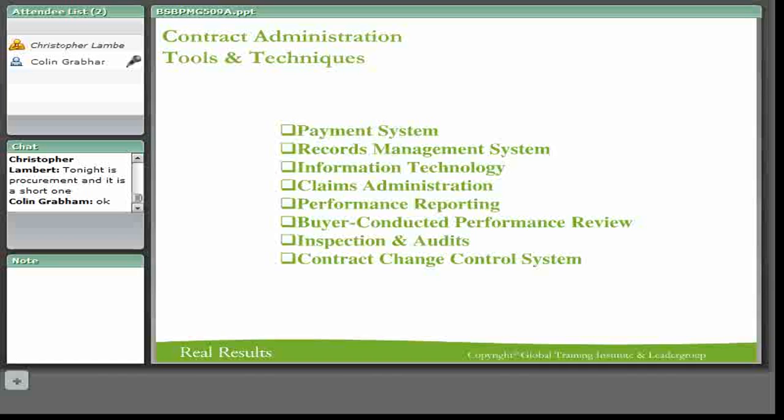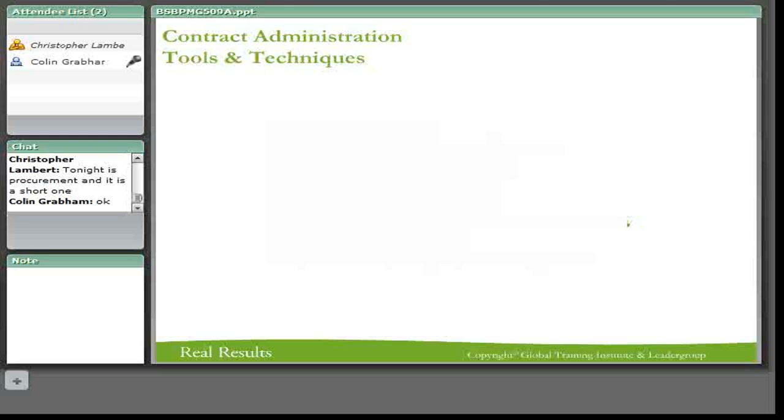Yeah, I'm saying it's one of the risks that you've got to bring up. You can't see what's underneath the ground. So if you hit that one, and this guy's going to charge you whatever you like, say no. Yeah, so if you include that clause in your change control system, that if you go over a certain amount, then we have the right to find a second contractor, then you should be fairly right. Is that what you're saying? Yeah. So yeah, those things happen. That's a risk. You see, we did our risk management last week. This would be a risk that this guy's going to charge you whatever you like.